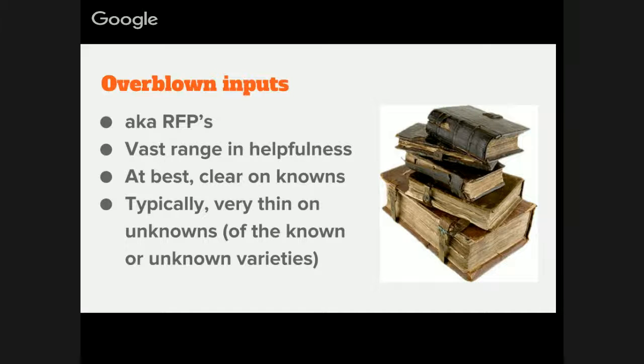A good RFP achieves that piece of the goal definition well, meaning it keeps the gap down to a minimum, meaning it's clear on what it knows and what it doesn't know. It's clear on what the gaps are. In more sophisticated ones, it's even clear what the risks are. Good RFPs say, we are aware these are the risks because there's lack of definition around this. We are aware that we don't know who the resource will be on this. This RFP is geared toward you as this specific kind of vendor that has these specializations, but we're aware that we're going to need these talents as well. So there's risk to the timeline or the budget in that form.